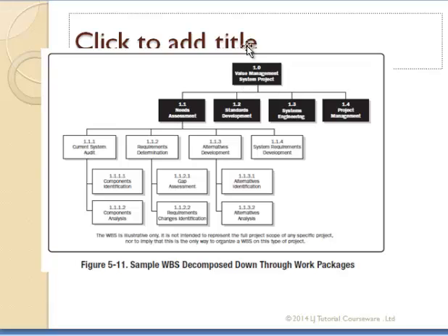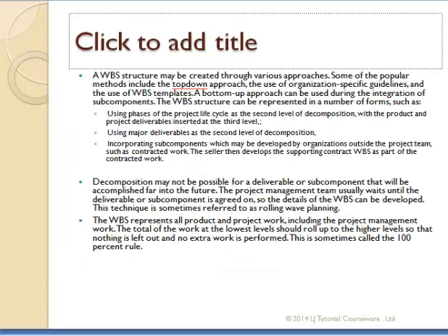Now we have a task, we break it down into various divisions and break this particular subdivision into further divisions. So now this can be building the house. This one can be digging. Under digging we have pegging, we have excavation, we have blinding, we have laying of blocks. So those are the tools and techniques when we are trying to create a WBS.